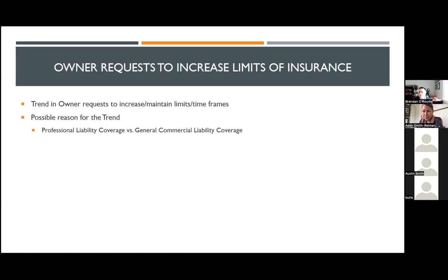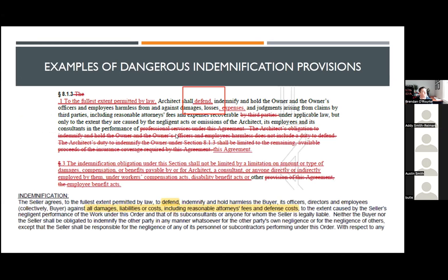I have a question about the indemnification. Our professional liability insurance advisor years ago recommended, because 98% of our client agreements have the indemnification clause in there, that we do a mutual indemnification clause, and in particular include, in the last part, "to the extent caused by the consultant's negligent performance of the professional services as provided within this agreement."